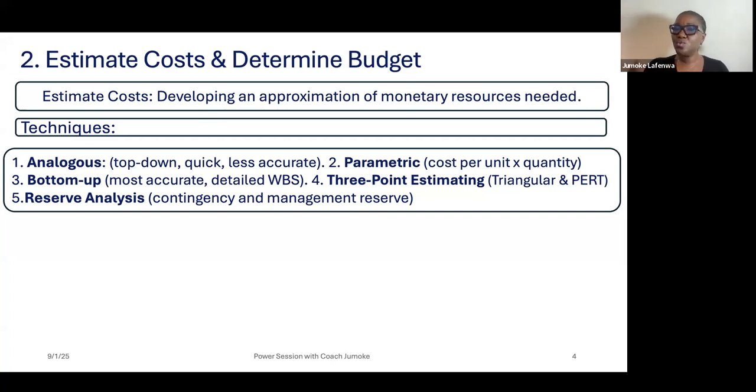It's important you know as a project manager that you should be disciplined: if the risk that you came up with a response for did not occur, don't spend that provision. All right, so that's the contingency reserve.